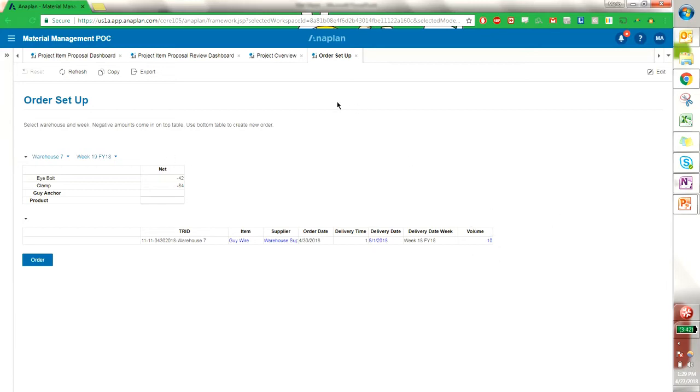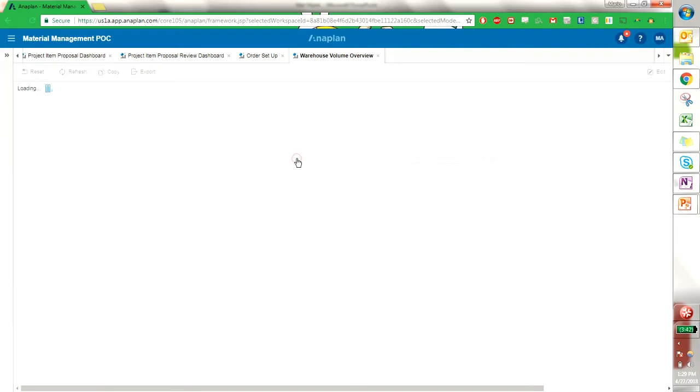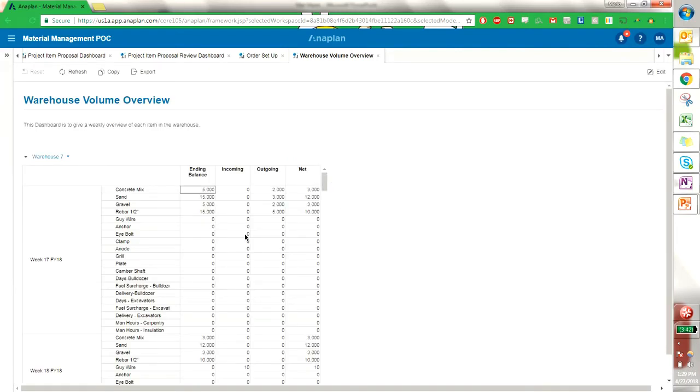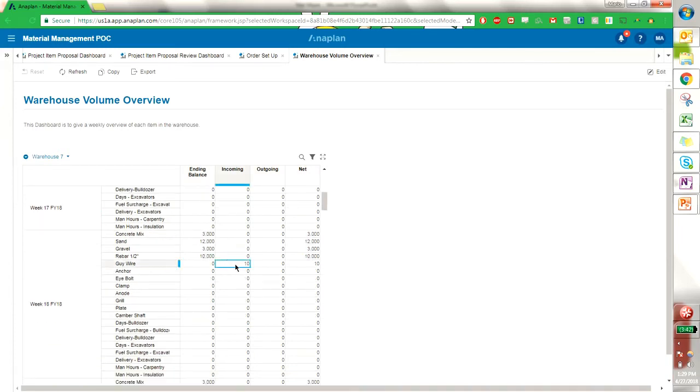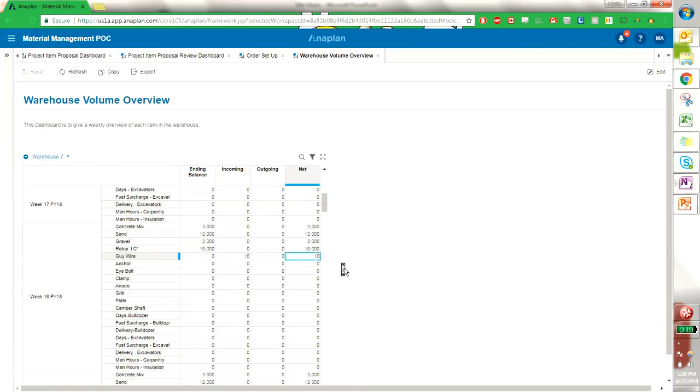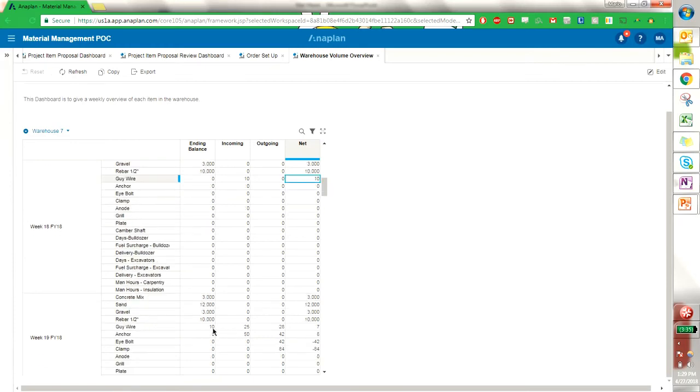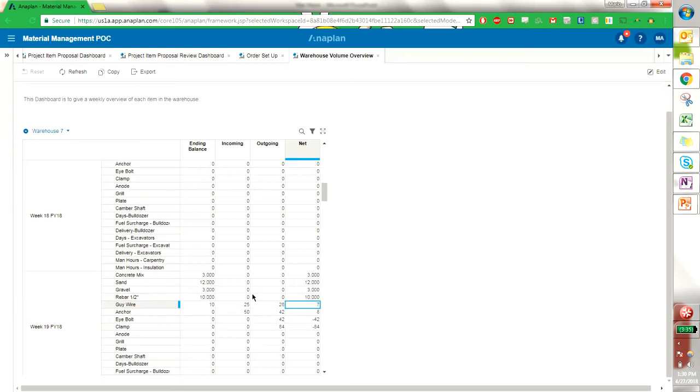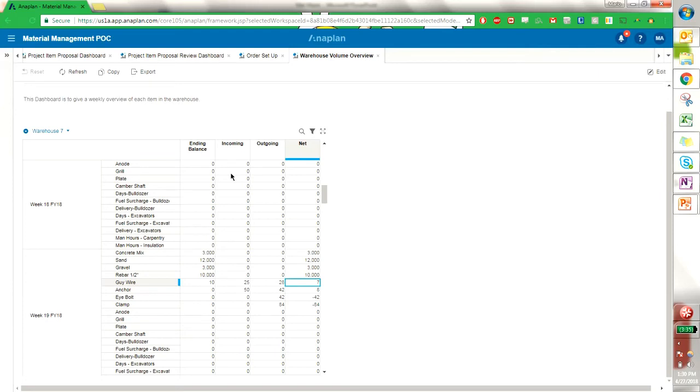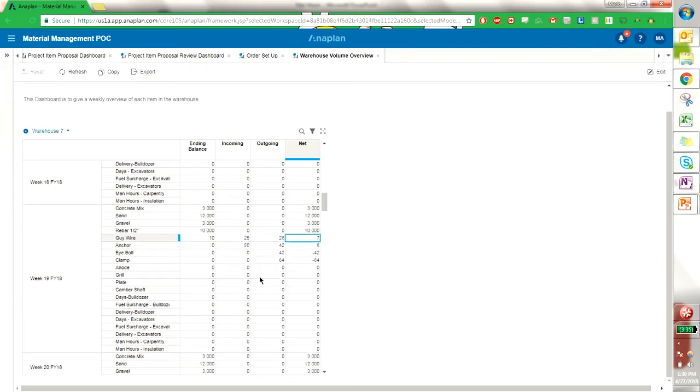If I go back to the warehouse manager dashboard, I can go and look at the volume overview. And we just saw the order that we created, we see that right here, week 18, it's incoming, and we have a net 10. Then the next week in 19 we have the volumes coming out, so that we have a net 7 where we prior to this had a net negative 3. So we can follow our orders incoming and outgoing, and it automatically updates in this dashboard here where our nets or volumes are going to be by item. So this helps me determine which objects I need to order and at which volume.